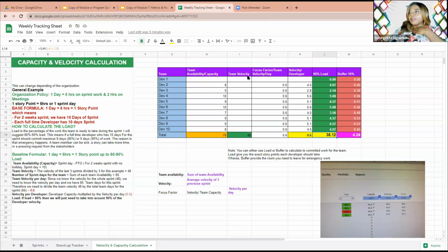Like one team member, traveling, of course, he was on PTO, but the problem is he finished his development and the testing wasn't done, and he had to travel for the next sprint. So we moved the testing, because that is a mainframe developer, they have their way of doing things. So they have to move the testing to the next iteration.